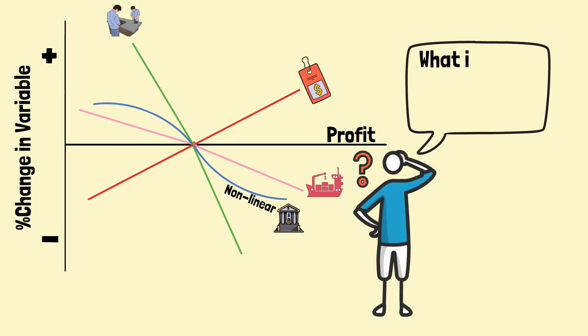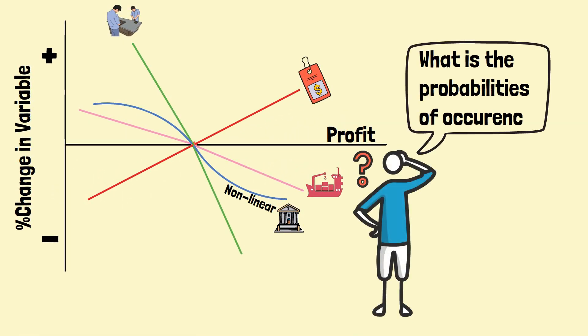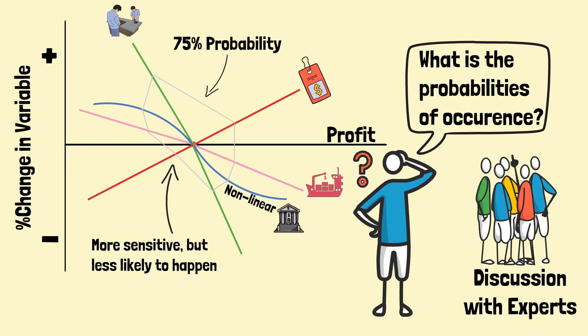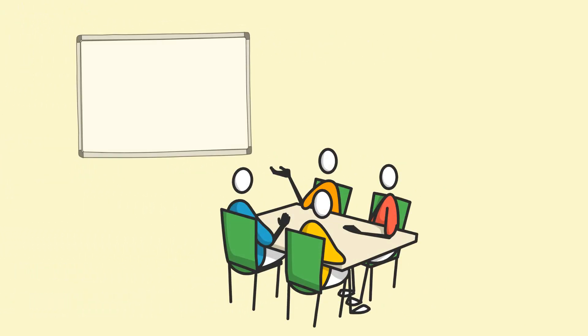The likelihood of the occurrence of the variation may be of interest to John. He can then get the views of a few experts to incorporate the probability contours onto the SPIDER diagram. The contour will show that certain variables with higher impact may be less of a concern versus others, mainly because the probability of occurrence is lower. John can then present the SPIDER diagram to the shareholders and discuss the potential impact on profit by different factors.